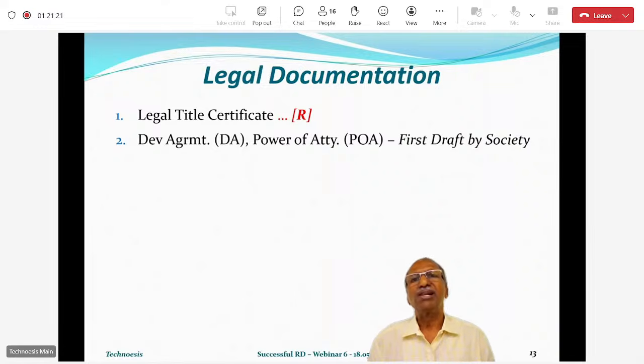Secondly, I have also seen that the society's legal advisor sometimes prepares a draft from his earlier ones, like what the developer's lawyer does. So he has to prepare a draft which is fully consistent with our tender document and the final techno-commercial offer, which are the reference documents.